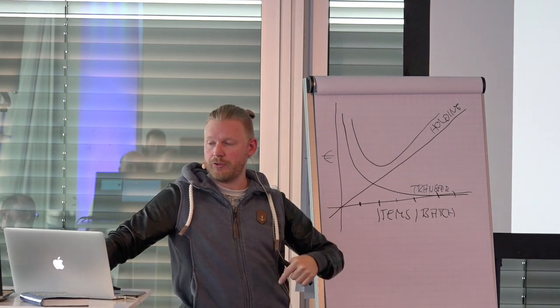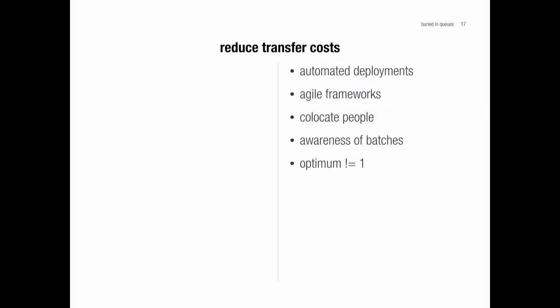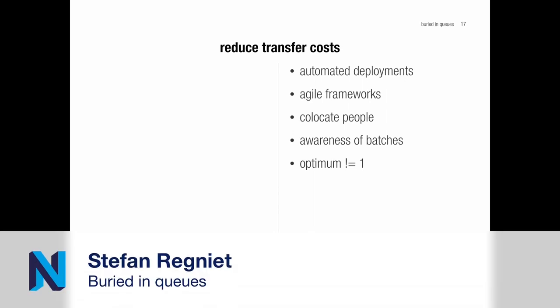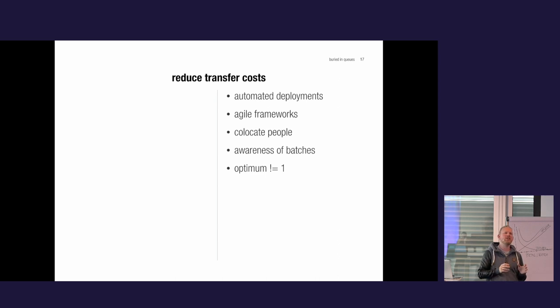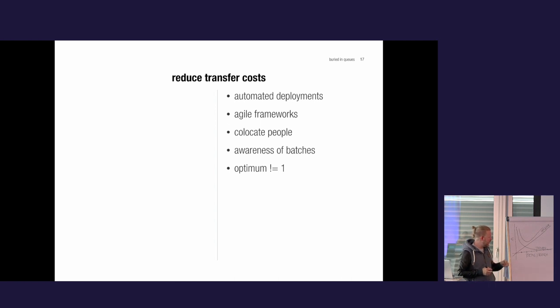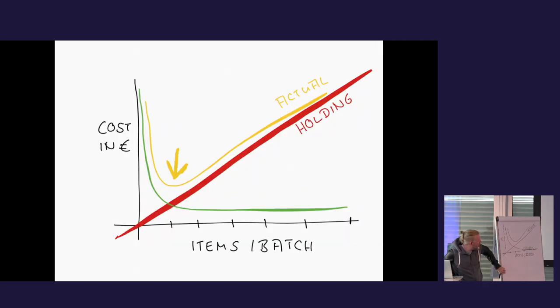You can reduce transfer costs through automated deployments, agile frameworks, or simply co-locating people who work together in the same room. Be aware that a batch size of one isn't always desirable — maybe it's easier to test two or three tickets at once. Optimum doesn't equal one. If you reduce your transfer costs, your overall costs will be reduced, and this is something you can actively do.